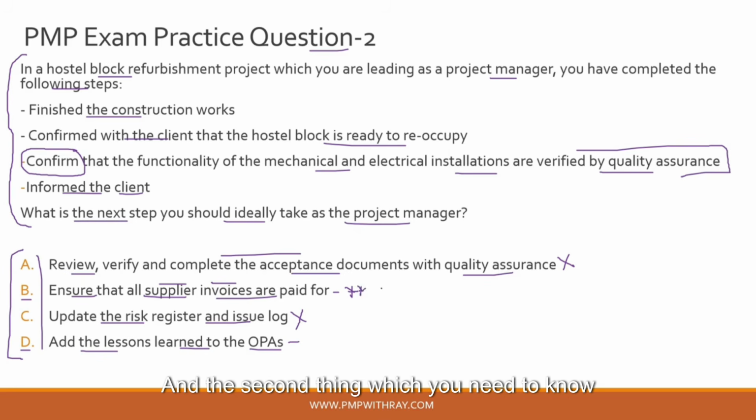Okay, and the second thing which you need to know practically as well, guys, is that when you are doing a project, ensuring that all the supplier invoices are paid might be something for which you need to take help from accounts or finance to get that sorted, but that is not a very core project activity. Because sometimes some of the invoices may have documentation issues, or some invoices might have fixed terms and conditions through which the payment will happen, etc., and that is generally managed by finance, which is a part of your organizational corporate finance. Okay, so that is not a core project activity.